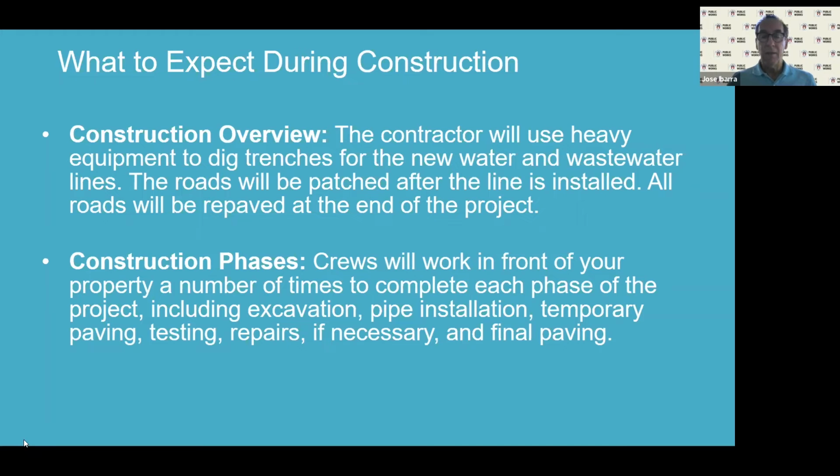And it's valid to mention that the crews will be working in front of your house several times, because in order to complete each phase of the work, they will be doing excavation, pipe installation for both water and wastewater, temporary paving, testing, repairs if needed, and finally the final paving of the street.